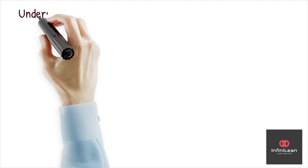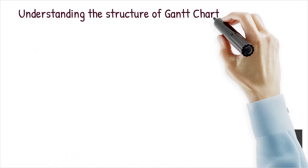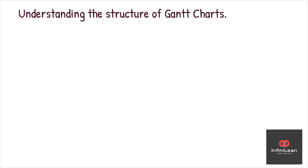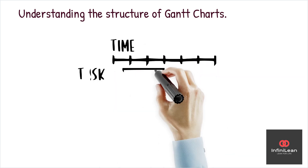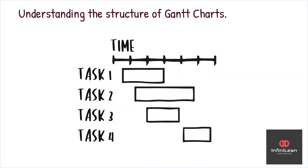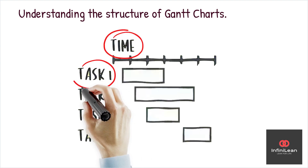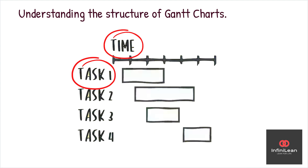A Gantt chart uses a horizontal bar chart format. The timeline runs along the top while tasks are listed down the side. Each task is represented by a bar, the length of which reflects its duration. This setup quickly shows task overlaps, deadlines, and dependencies. In Lean Six Sigma, this clarity can significantly improve collaboration among team members as everyone can visualize the process flow at a glance.